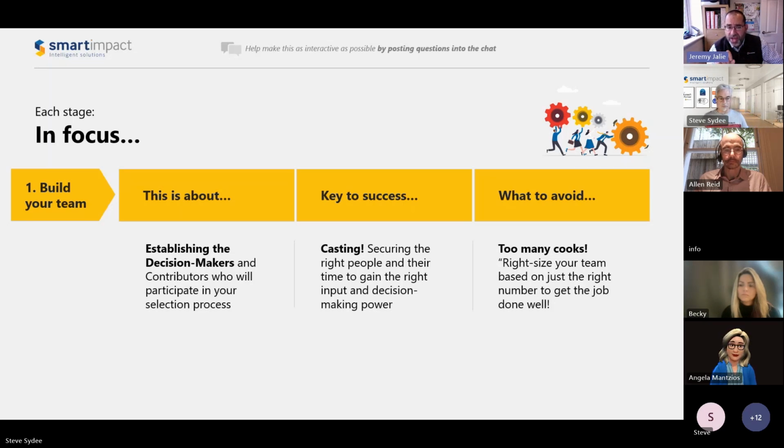Depending on the size of the organization, you've got to be realistic about who can be involved, but typically you have someone who is the project sponsor. Ultimately that's the person who's responsible to the business for leading the project and delivering the new system that you're implementing. You probably also need someone who is a business owner. That's the key person in the organization who's going to benefit from the output of the project. Typically in our types of projects, that's a director of membership or a director of education, or someone who is looking for a significant change through this project.